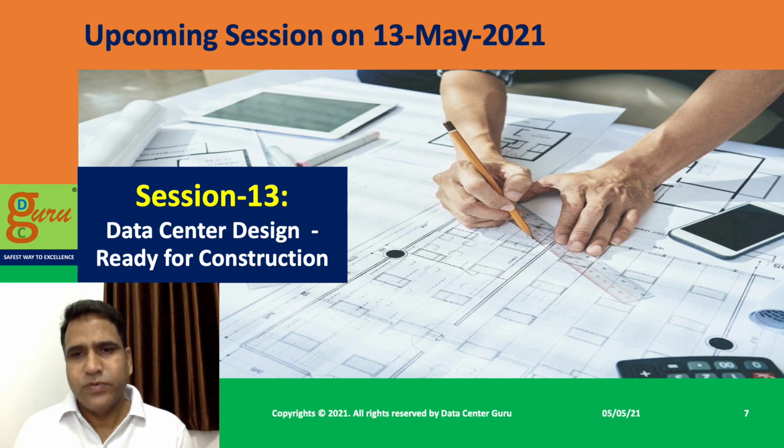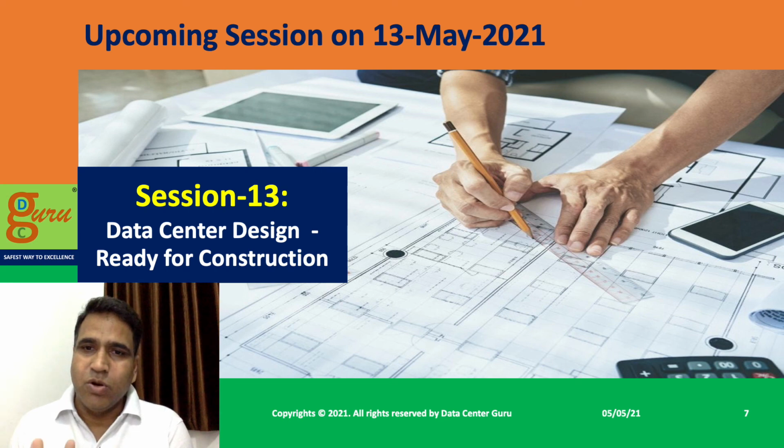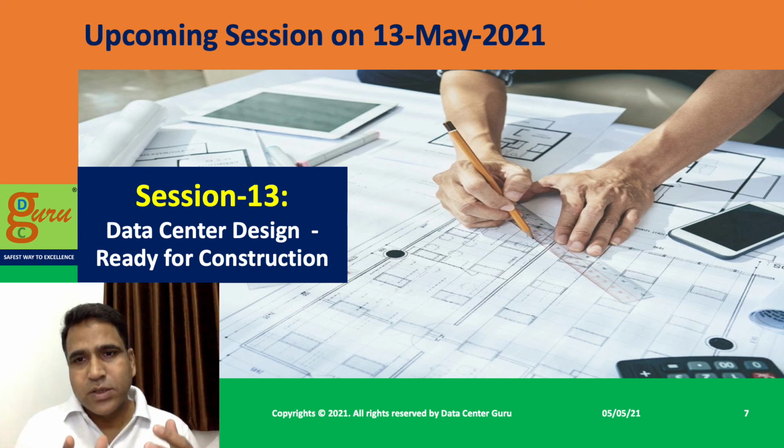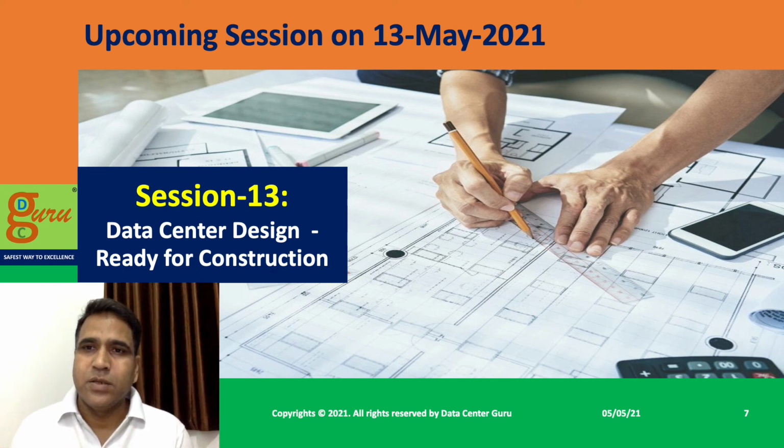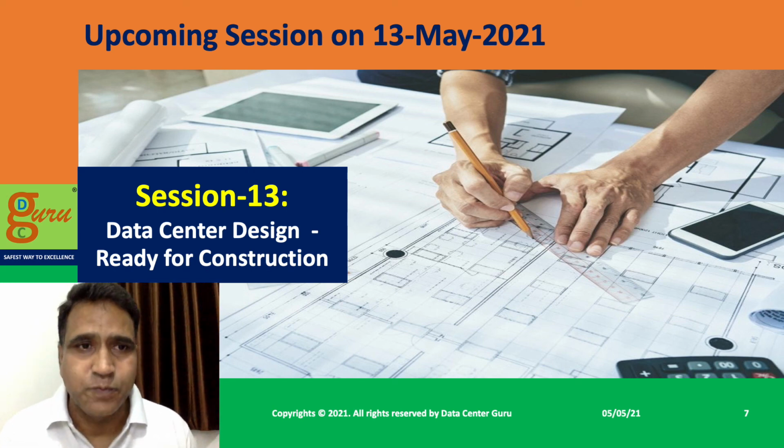There are a few differences, and those have to be met to avoid conflicts or gaps during the implementation, which we have observed a lot, because due to the shortcoming of real construction drawings, the real implementation of the site gets compromised, and a lot of the time rectifications happen due to inadequate planning in that phase. So the last phase, the fifth phase, it is very, very important to go through.